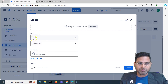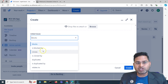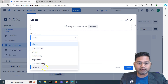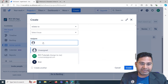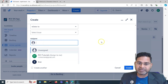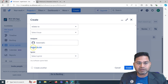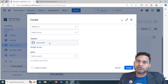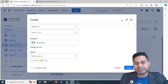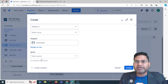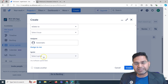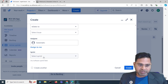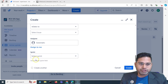You can also add labels — for example, create a new label called 'ios' — and then search for all issues with that label. The linking section lets you define relationships: blocks, is blocked by, cloned by, duplicate, or relates to — and you can link to another issue. For the assignee field, search for the team member you want to assign the issue to, or click 'Assign to me'. Finally, the sprint field lets you select which sprint to assign the issue to.